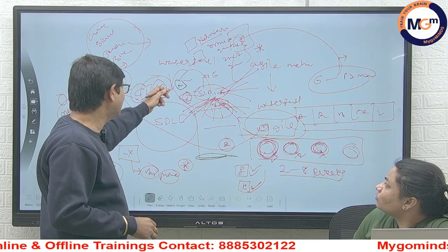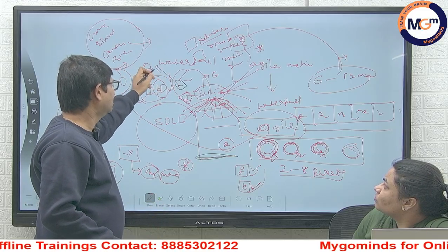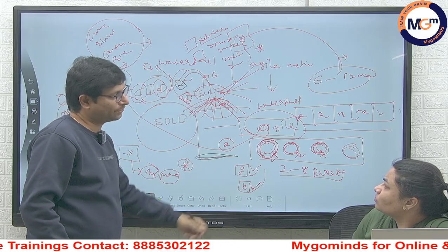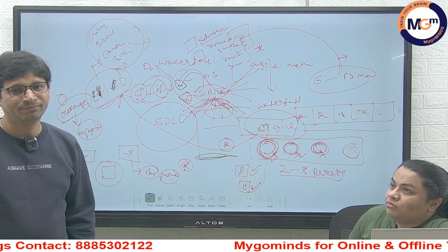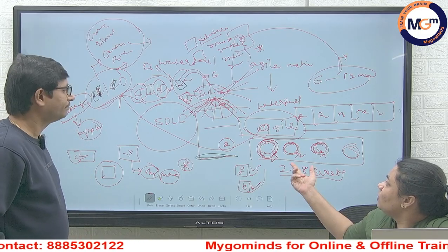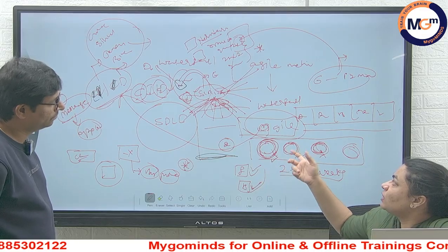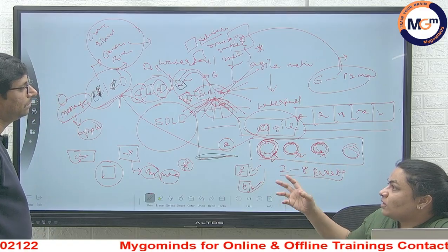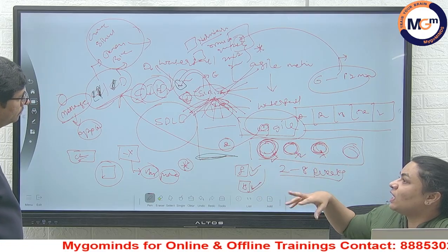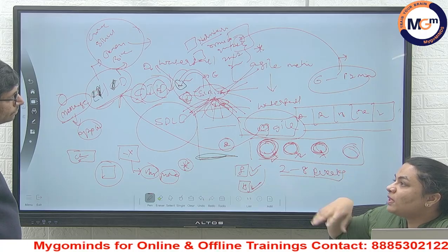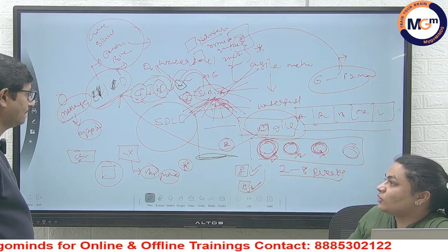If you are not done this, the status should be not done. This will automatically go to the next sprint, right? Yeah. So that is the sprint Scrum will define, guys. We'll be looking into how much percentage the work is done, what is left. It will get into backlog grooming sessions. We will discuss, and then we can attach it to the next sprint or probably next upcoming sprints whenever we can fit into this particular feature.